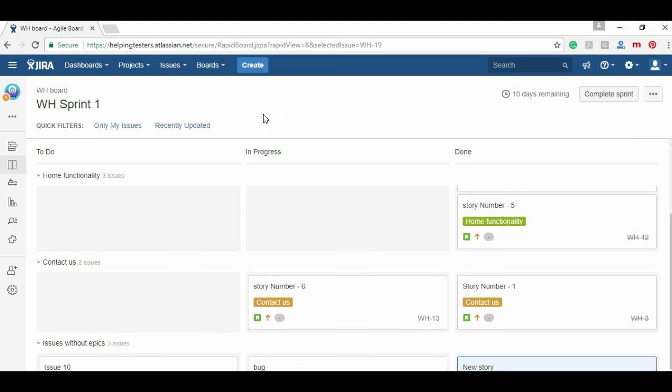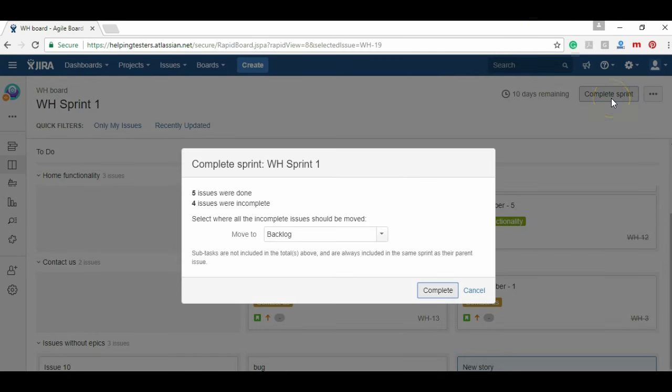As soon as I enter the sprint one, you will see here an error message, a warning is coming - sprint scope will be affected by this action. What it means is that during the start of the sprint, you have identified that this much section would be covered in this sprint. But now you are adding more tasks into the sprint. So that is the reason there can be a delay in the sprint - in this time all those tasks would not be able to be completed because you are adding more tasks. So just hit on create. Let's go again on manage boards, go to the active sprints. And let's close some sprints. So this is how the real working goes. There are changes of the status, testing done, bugs are logged, and sometimes new issues are also added into the sprint.